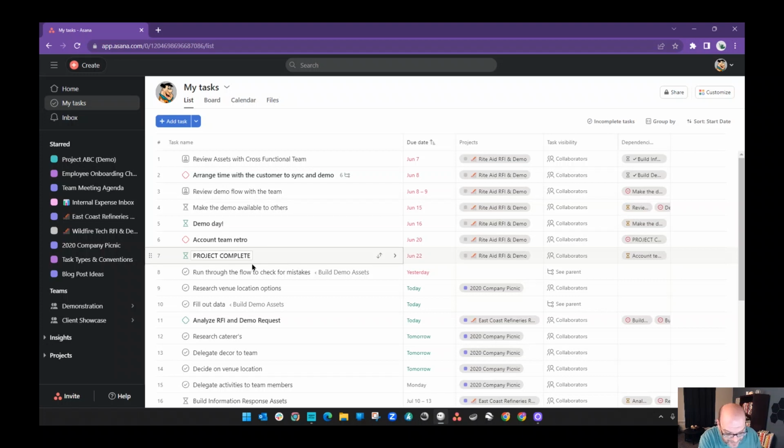To review, number 5, don't go overboard on tasks. Number 4, only use Asana My Tasks for action. Number 3, remove those old templates and switch them over to Asana templates. Number 2, remove assignees from tasks in archived, old, or on hold projects. A lot of people don't realize this, but if we archive a project and there are incomplete tasks in that project that are assigned to a person, those tasks will still show up in their to-do list.